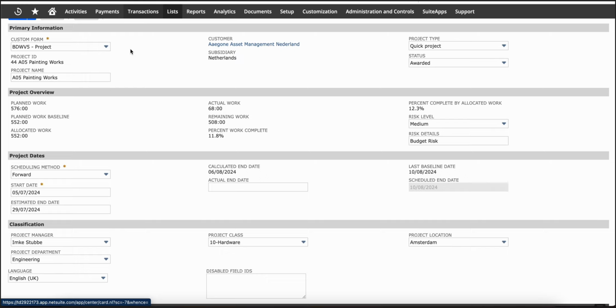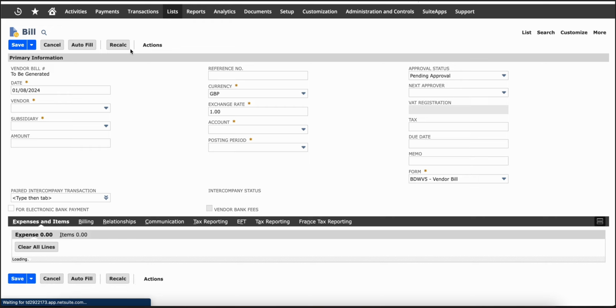And let's say you have purchases that you want to assign to the project. Maybe you'd want to have them as billable later on, or to just track the costs for the project more effectively. You can assign the project now as a line item. So for every purchase or every expense, you can assign the job or the project record as an associated record to it.